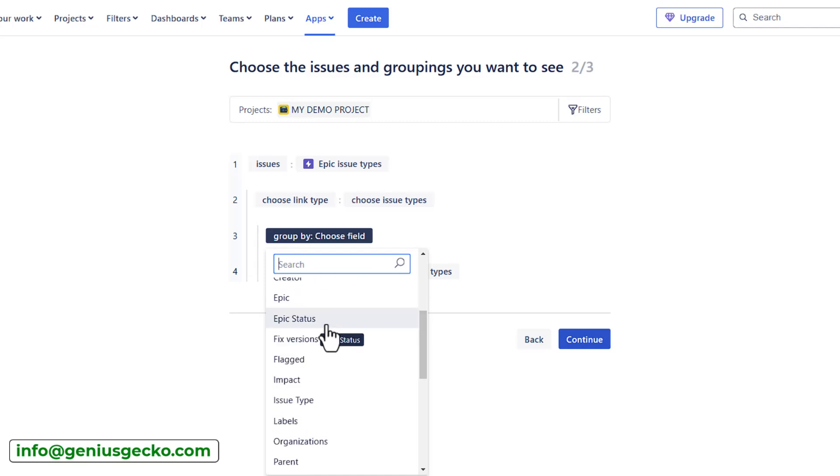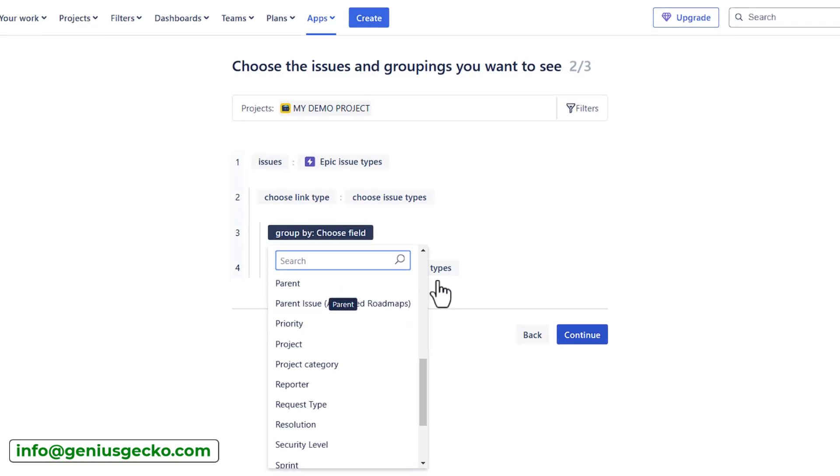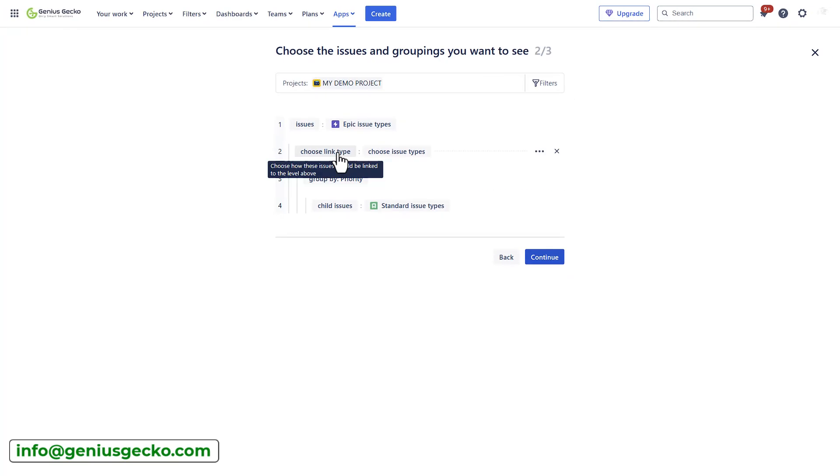The other option is the group by, and here I can select by which field value I want to group. For example, if I have priority, which would be the high, medium, low, as an example, it will create additional levels with this hierarchy field values. And underneath, it will nest all the issues with that priority value.